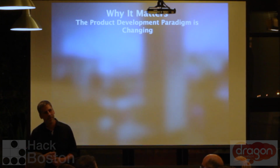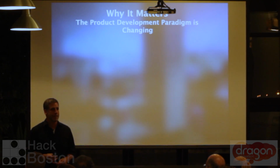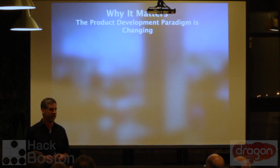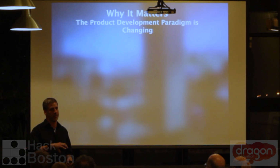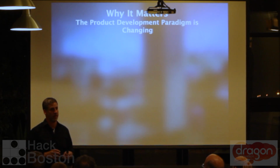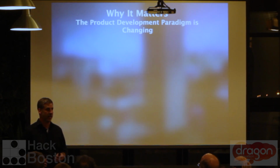Would you ever do a pilot run at a different manufacturer, say if you want a few hundred for market testing? Right. So there's basically 3 strategies, broadly speaking, you could do. You could build low volume in China and then deal with the headache and try to scale it up. You could build low volume in the US and then sort of accept the higher prices. Or you could do the hybrid model. And the challenge with the hybrid model is that you're probably going to need to buy another set of tools because it's hard to ship. It's not impossible, but to move the tools.